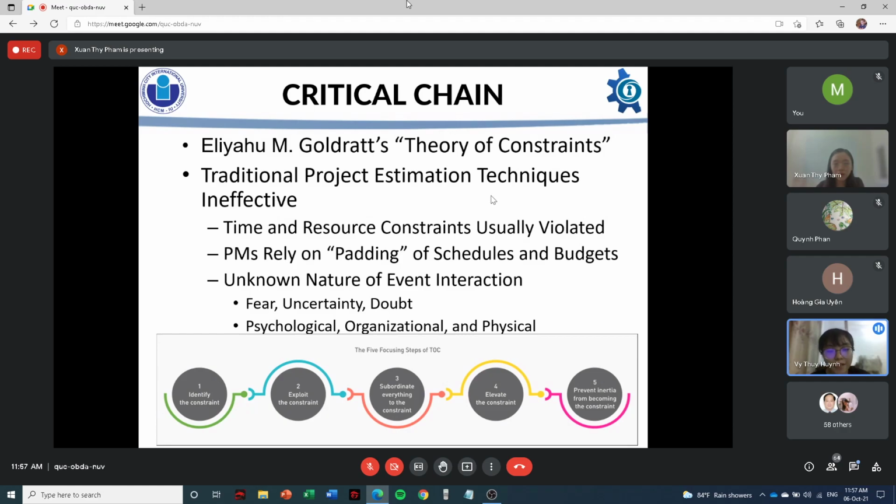The critical chain method is different from the more traditional management philosophy based on the PERT algorithm and critical path management. Those methods are focused on rigid scheduling and the task order, while the critical chain method is about keeping the resource level and expecting more flexibility during the start time. So, how can we understand this critical chain method?